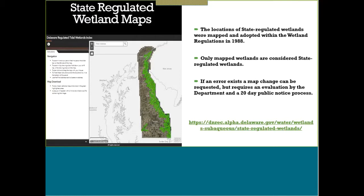Also, just to add to that point, the Wetlands and Contiguous Land section has exclusive authority to determine jurisdiction. So even if you routinely go out there and conduct wetland delineations based on the Corps manual, you still need to come to us to get that jurisdictional determination.